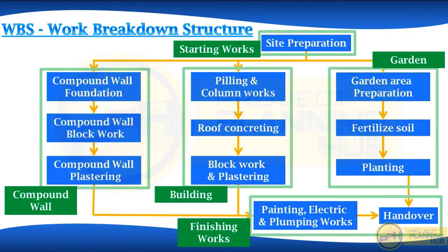In real world projects, this is how we start working on schedules or plans. First, we will take the project. Then we will cut that project into big pieces. Those big pieces are WBS, work breakdown structure. Again, we will cut those big pieces into small pieces, and those small pieces are called activities. After listing all these WBS and activities, we will start entering those in Primavera. Here we listed all the WBS and activities for our project. So let's start entering these in Primavera.